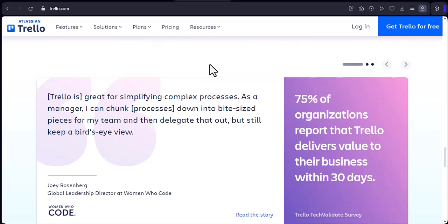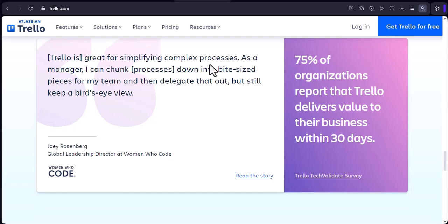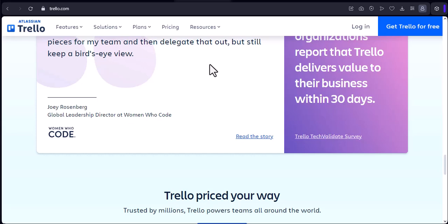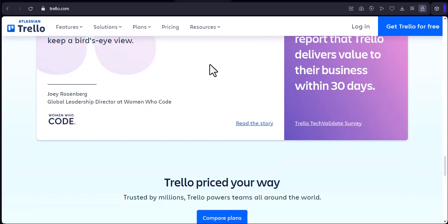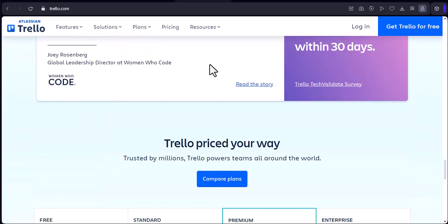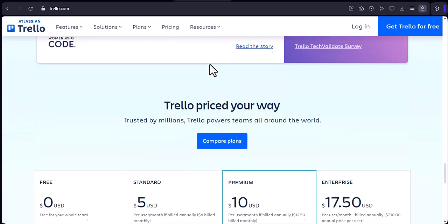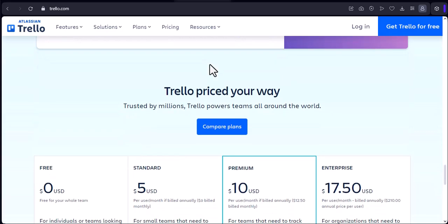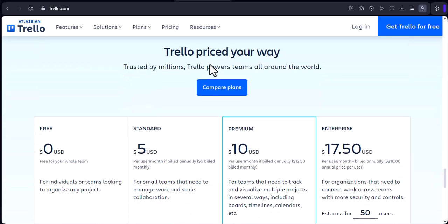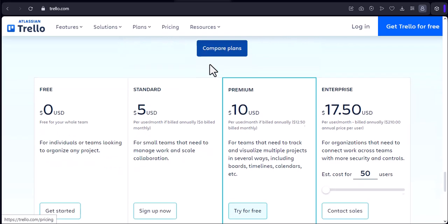As tasks move from the conceptual stage to active work, they land here. This provides a clear visual of what's currently being tackled. Review/Testing. Once a task is nearing completion, it might need to go through a review process or some form of testing before being finalized. Done. The glorious final column. This is where completed tasks reside, providing a sense of accomplishment and a visual representation of your progress. However, feel free to customize these lists to perfectly match your project's unique workflow.